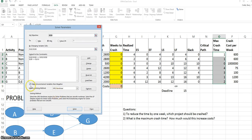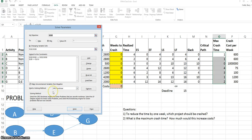Be sure that the Make Unconstrained Variables Non-Negative box is checked. This will make sure we don't have any negative crash times. For now, the solving method that appears is adequate. Now importantly, we're going to click Close to start with and just save the information we've entered into Solver.